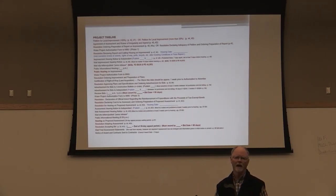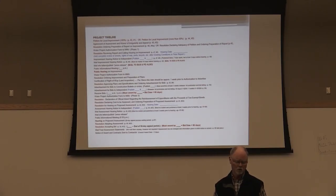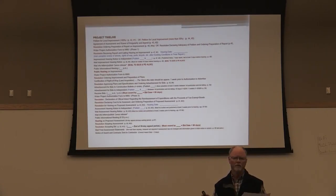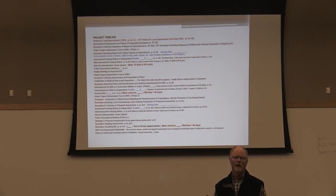After that, we take the authorization form back to Marshall Municipal Utilities a third time to get their concurrence on what the potential costs might be. The bids are in — hopefully a little less than anticipated. This process ensures that everybody is aware of what's going on and the potential costs of the project.